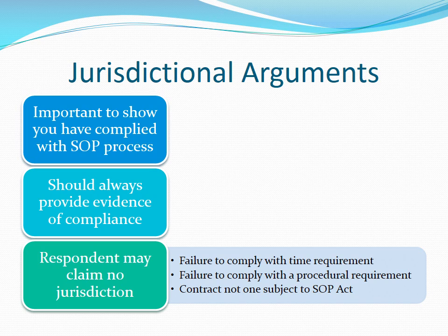If a procedural timeline has not been met, such as the time allowed to lodge an adjudication application, then again, it is not possible to use the security of payment process. If you are going to use a jurisdictional argument, you need to ensure you mention this in your payment schedule to alert the claimant that there could be no benefit in continuing with the security of payment process.